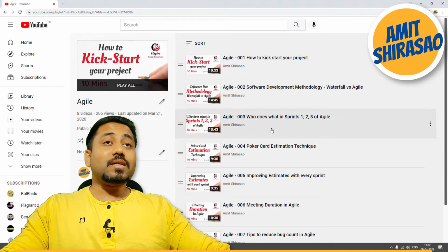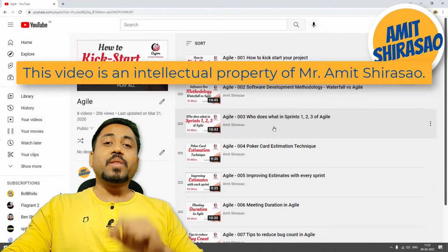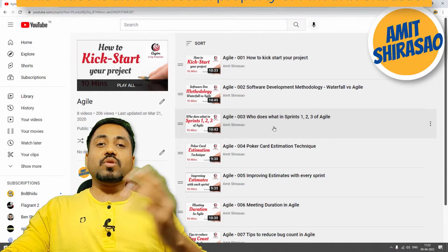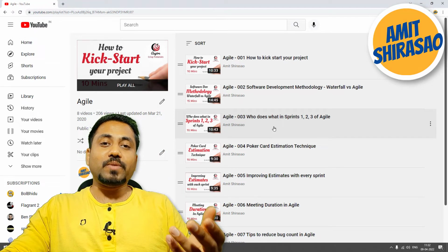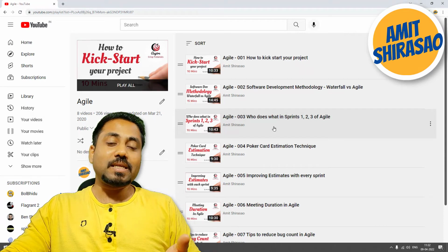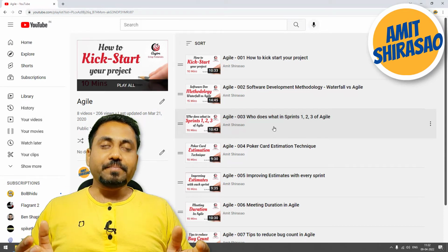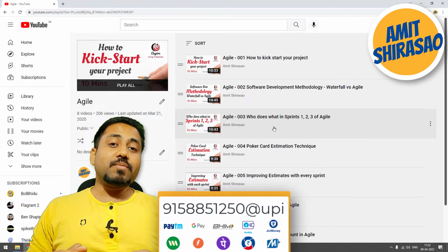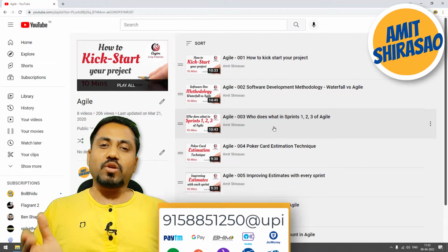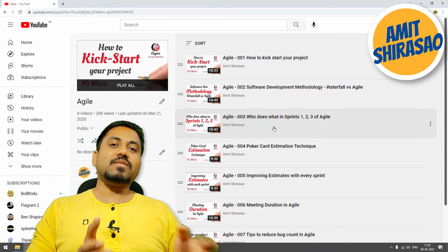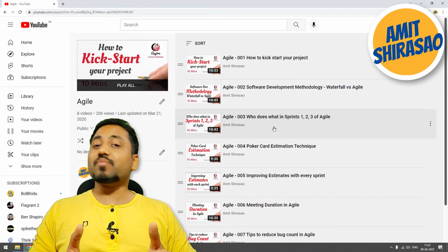The third video talks about what you do in sprints 1, 2 and 3. So in sprint 1, of course the stories are not ready with you. So what will you develop? You won't be able to develop anything, you won't be able to test anything. So your testers and developers only set up their machines. And the BA people, they start making the product backlog. Product backlog maintenance is a continuous process. So at least from sprint 1, they start making the product backlog.